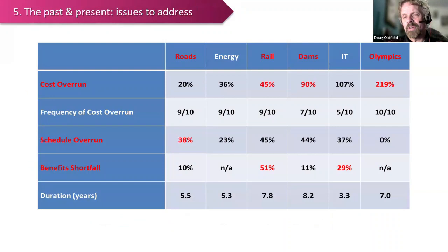Of course, when we look at projects, I don't want to point fingers at cost or schedulers independently, because when we look at the statistics and the outcomes in the project space, projects are prone to overrunning on both cost and schedule. Sometimes it's all about the schedule overrun, which is typically what you might see on some projects. But then other projects have a set in stone completion date, like the Olympic Games or the World Cup. Those things don't tend to overrun on schedule, but inevitably the costs get out of control. So the whole point of project risk analysis is really about trying to understand what might happen in the future, so that we can ultimately make better decisions in the present day and manage our projects better.